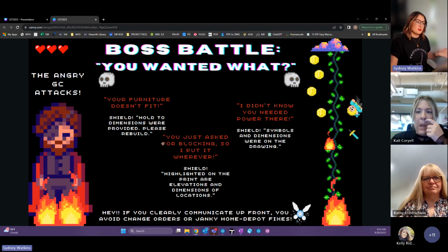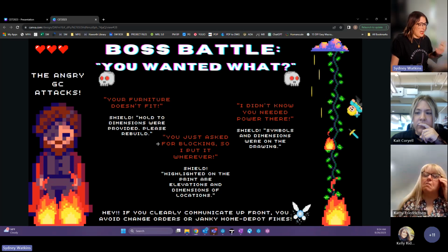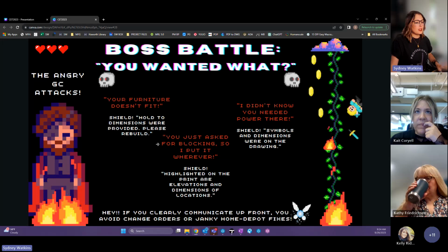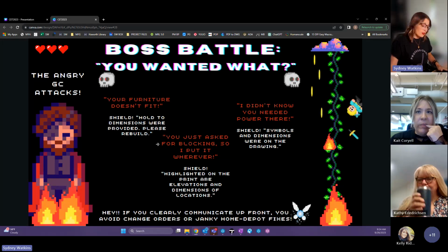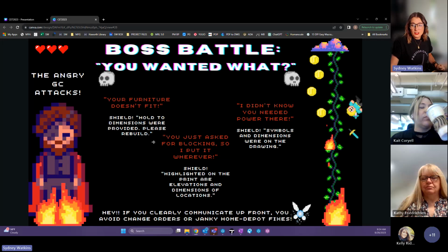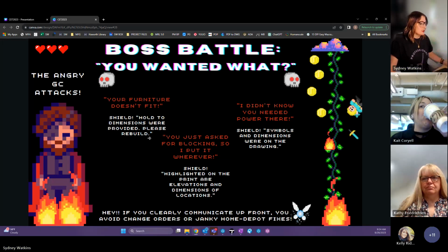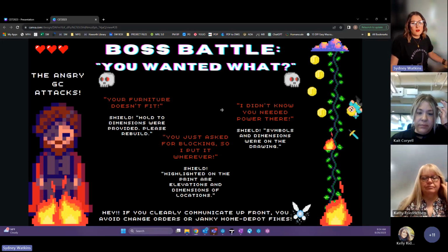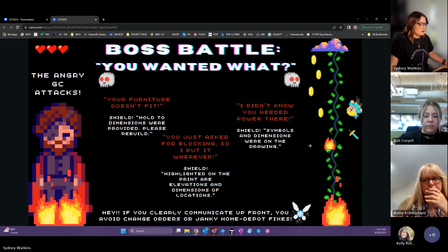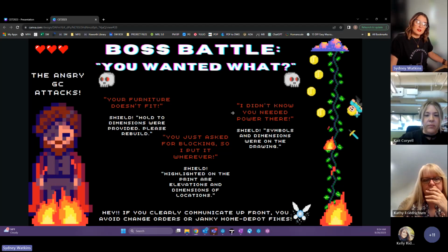You just asked for blocking, so I put it wherever. This actually happened to me and it blew my mind. I asked for blocking in the wall and they said, yep, no problem, I have it in an email. Well, they put blocking in the wall, but they put it from the floor to 30 inches. I don't have an overhead that I need at 30 inches. It's all the way up here. And they had to tear open all the walls and put blocking in them. It was awful. And then, well, I didn't know you needed power there. I was like, well, yeah, you did, because I put bright red symbols with bright red dimensions.